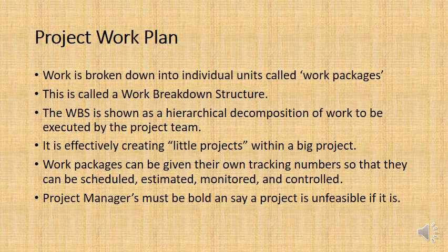So one of the first things we need to do after we've defined the project scope is we need to make a project work plan. And that usually happens initially with the project manager beginning to break down the project into small individual units, which we call work packages. Now these little units will be basically trying to break down the project into lots of small projects. And the way we divide these units or work packages, it's usually done in order.